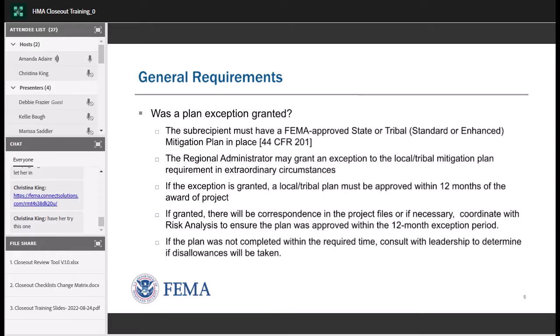At closeout we check if a plan exception was granted. The sub-recipient must have a FEMA-approved state or tribal mitigation plan and a local or tribal mitigation plan in place before the project is awarded. In rare circumstances, a plan exception is granted by the regional administrator, allowing a project to be awarded before the plan is approved. The condition is that the plan must be approved within 12 months of the award. If that condition was not met, further consultation is needed because disallowance of costs will likely have to occur.